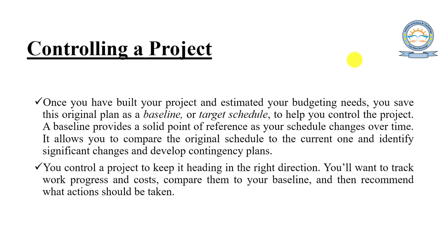The next principle is to control a project. Once you have built your project and estimated your budgeting needs, you save this original plan as a baseline or target schedule to help you control the project. A baseline provides a solid point of reference as your schedule changes over time. It allows you to compare the original schedule to the current one and identify significant changes and develop contingency plans.